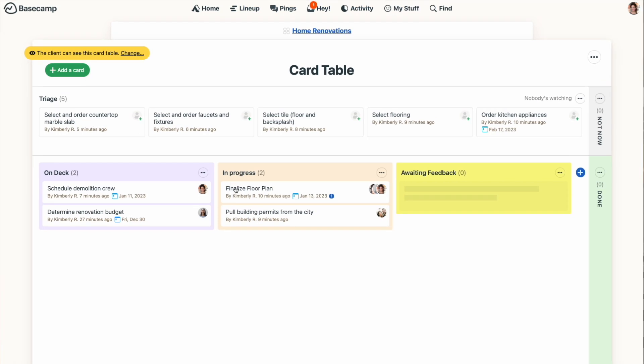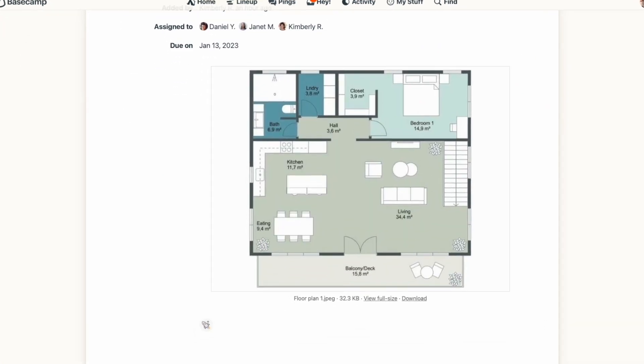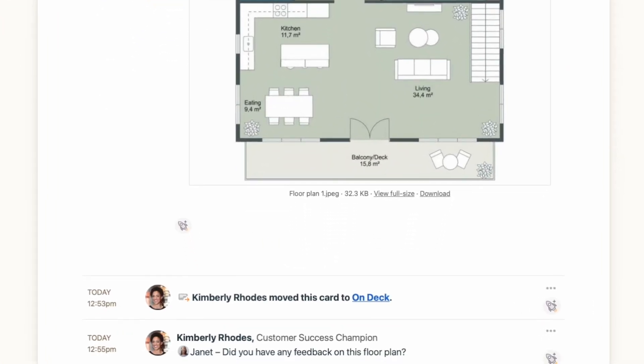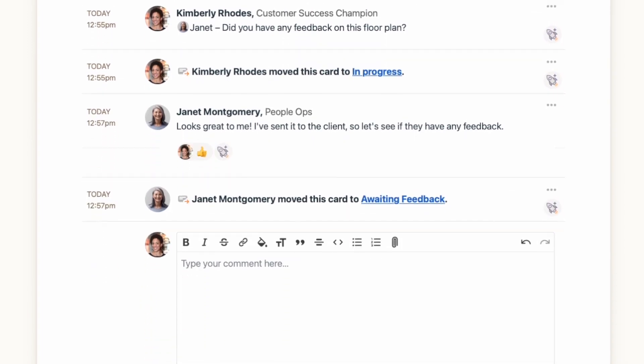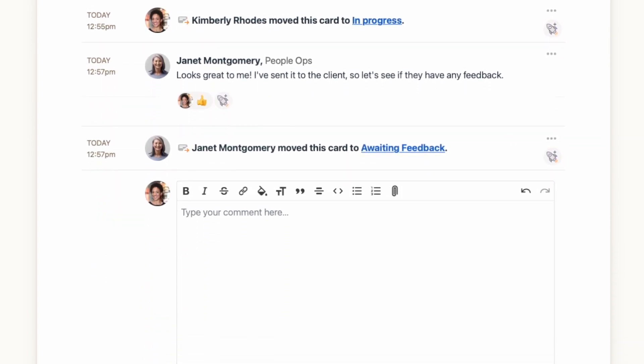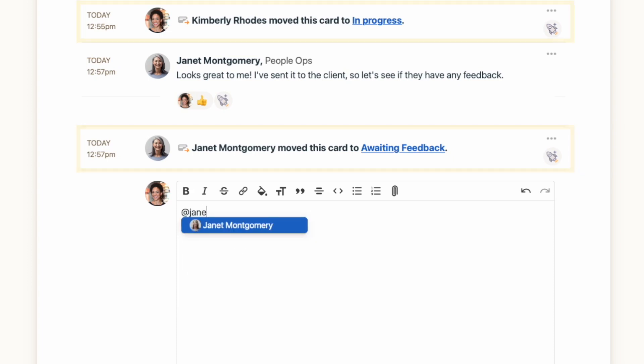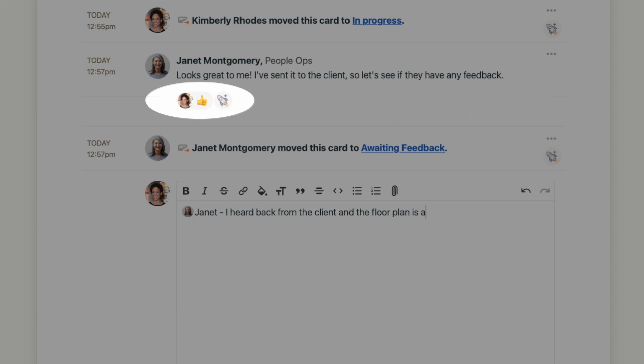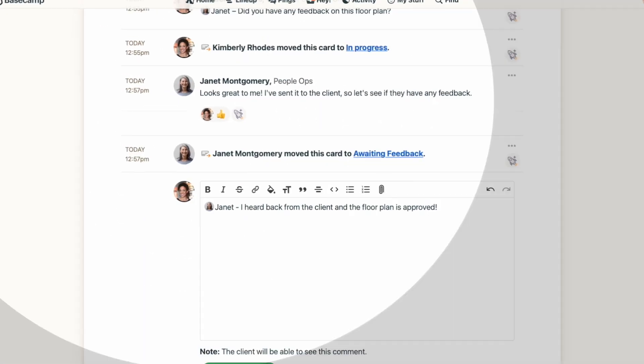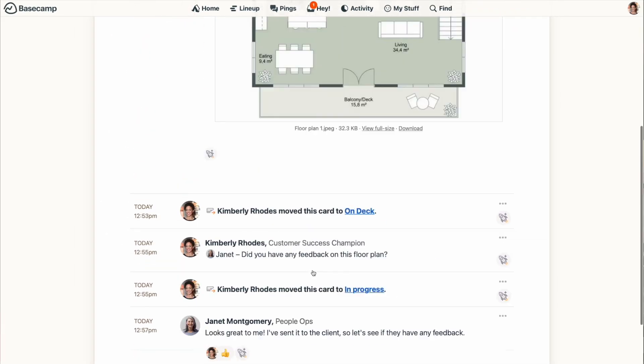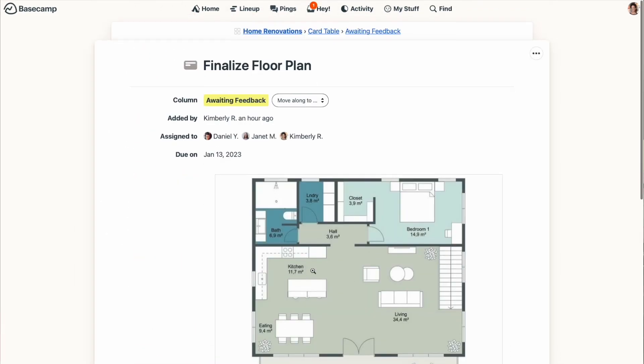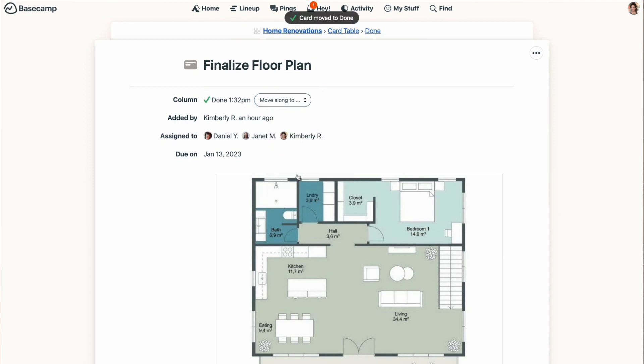When you click on a card, you'll get a full view of it. Anyone who has access to the card table tool can comment on the card, and you'll also see when the card has changed columns. Just like in other areas of Basecamp, you can at mention someone to make sure they get notified and give someone's comment a quick boost. With the card open, you can also move it to another column by using the drop down menu at the top. All the communication about the card stays on the card, so it's really easy to stay organized and keep things on track.